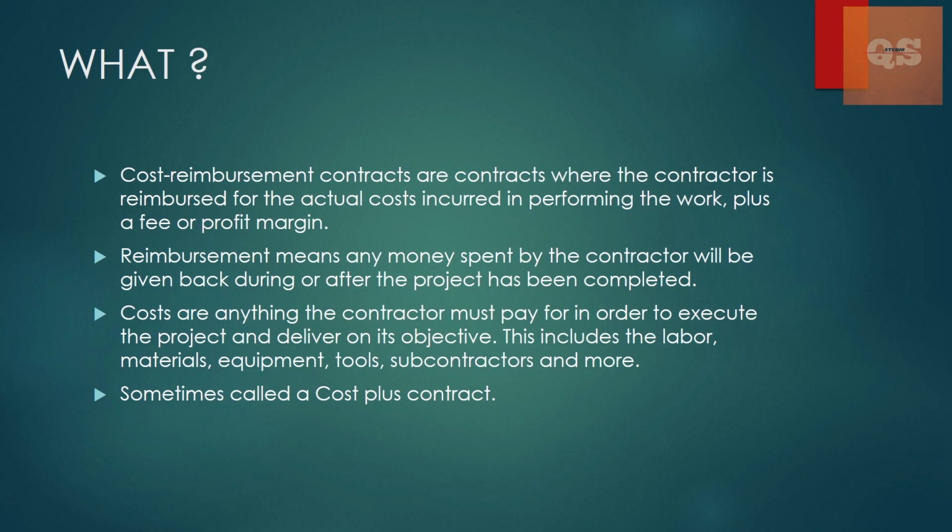Now, other than these labor and materials, there are other charges like the indirect charges. These are basically the direct costs, the labor, materials, equipment and all, but there are always indirect costs like the overhead charges, some head office charges. How that will be calculated is usually negotiated between the contractor and the client before this contract is actually agreed upon and signed. So that depends on project to project, client to client.